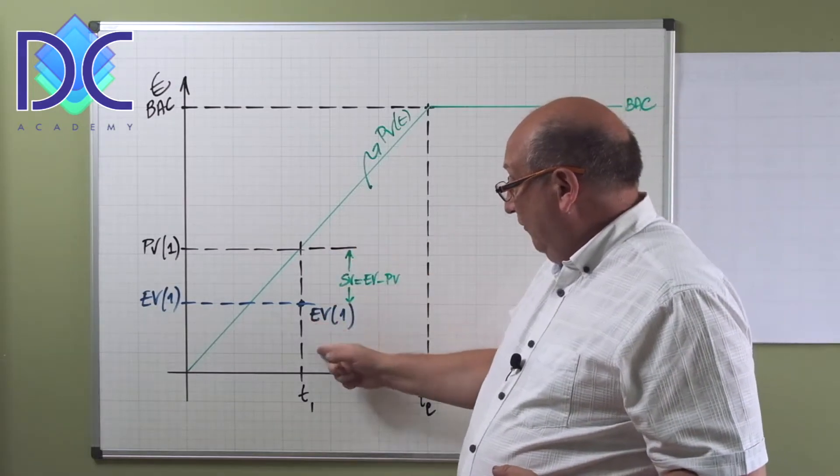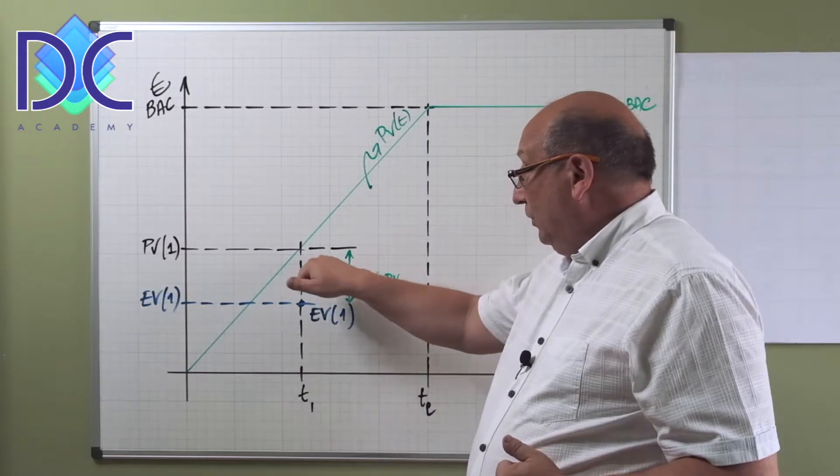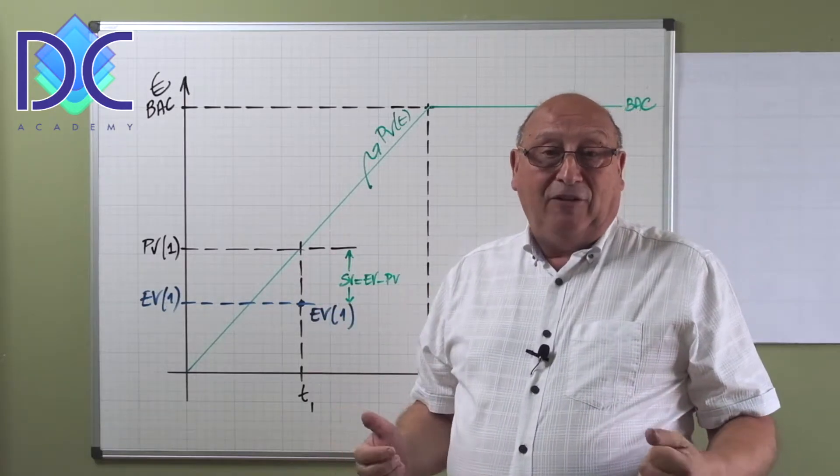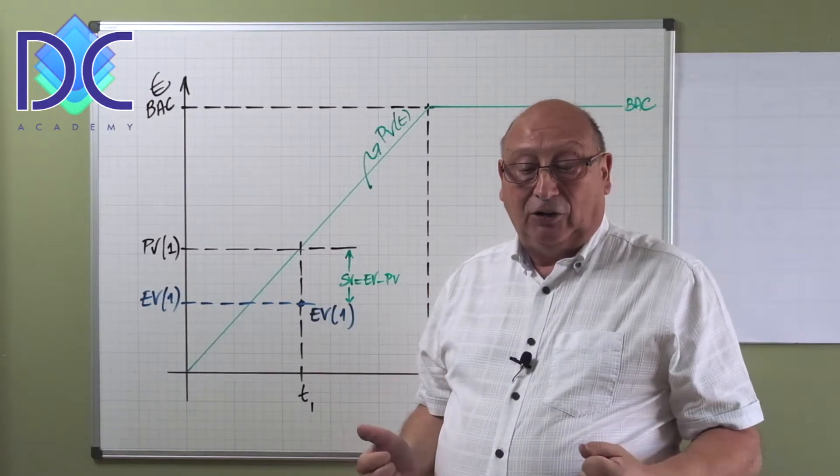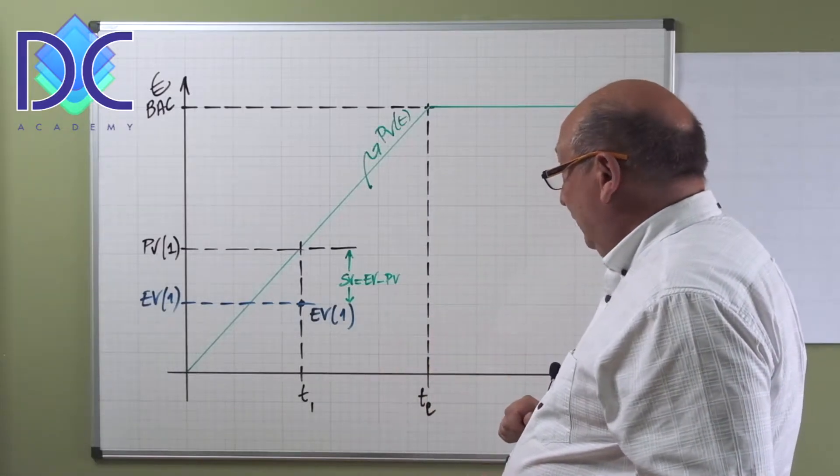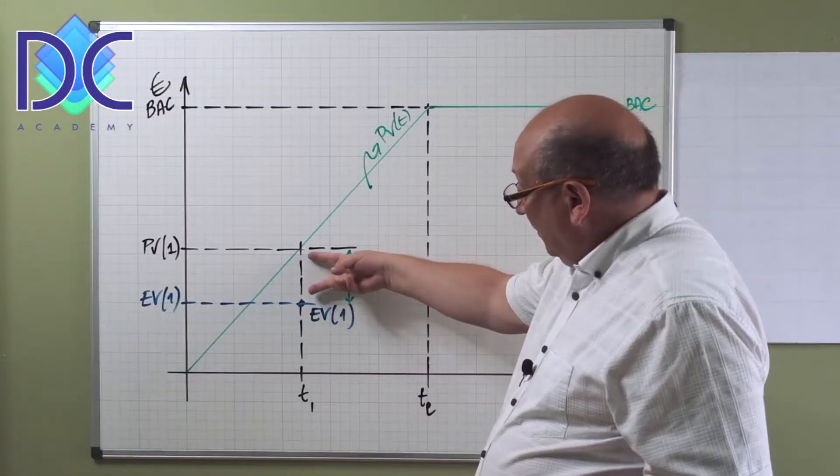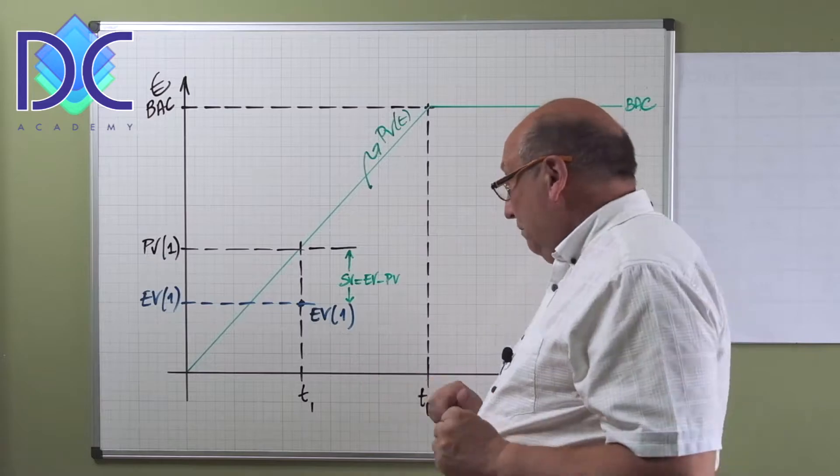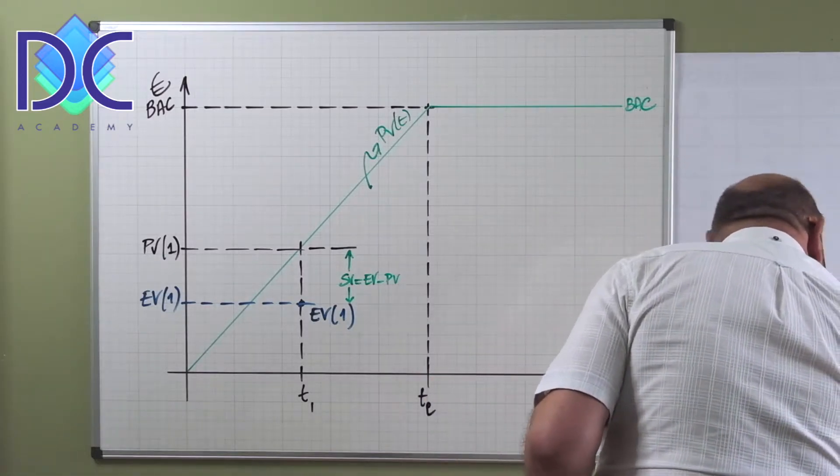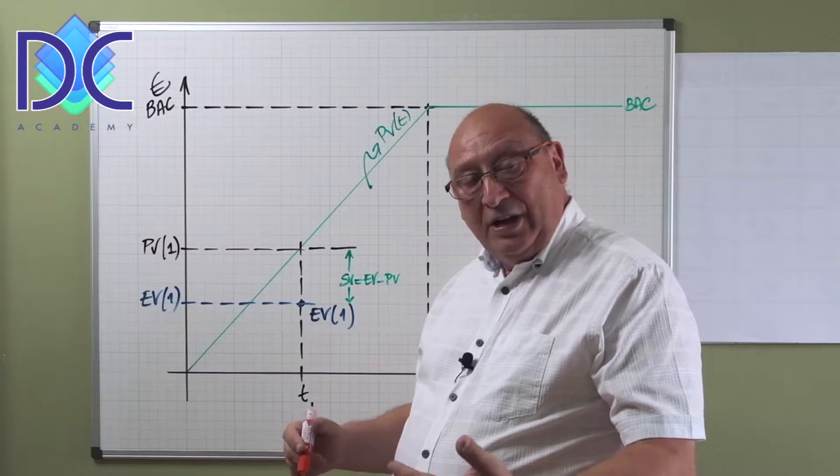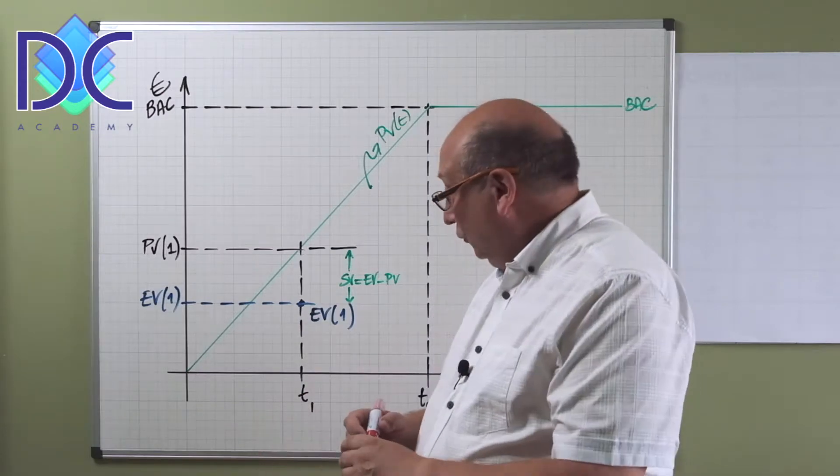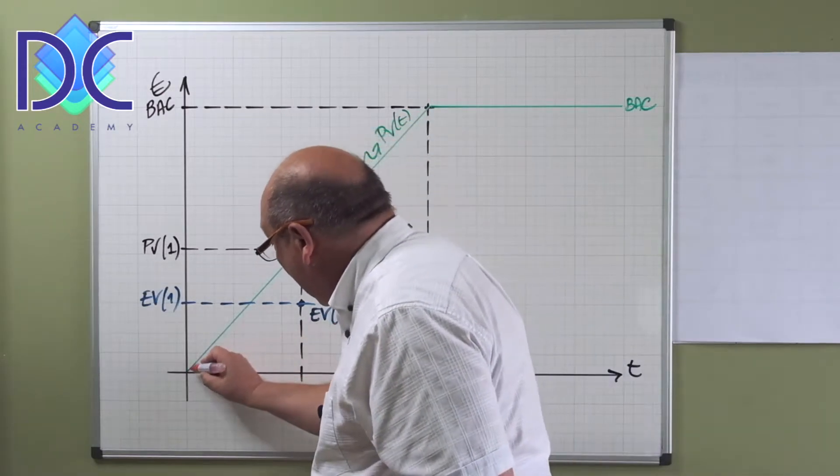So when we finish the project, all the work is done, all the value has been earned. Now here we see that at t1 we have earned value which is lower than the plan value, which means that the schedule variance is negative, which is not good. So we measure the schedule variance here.